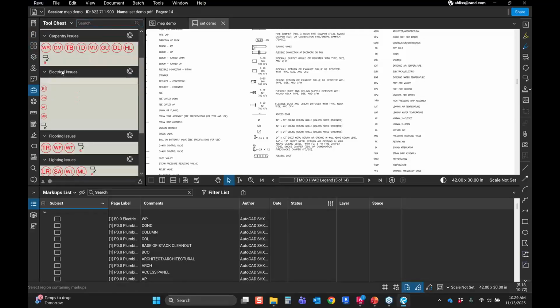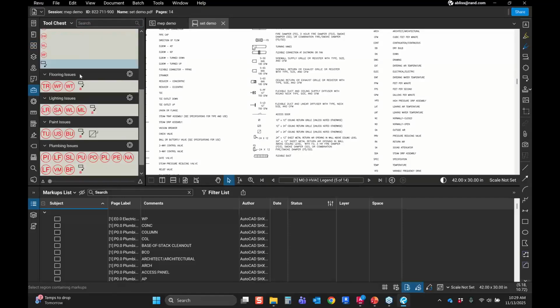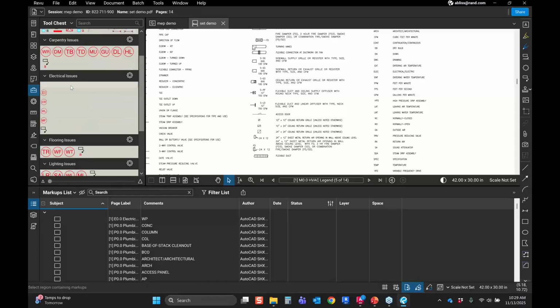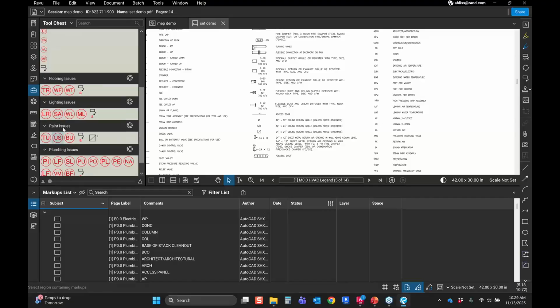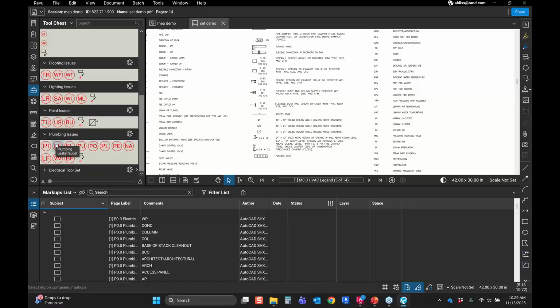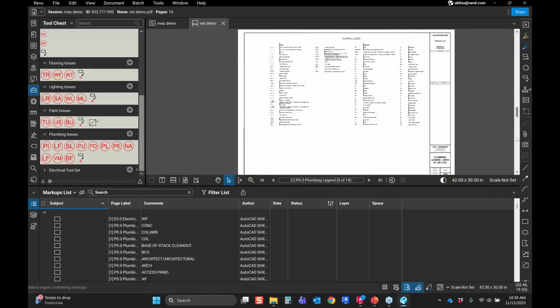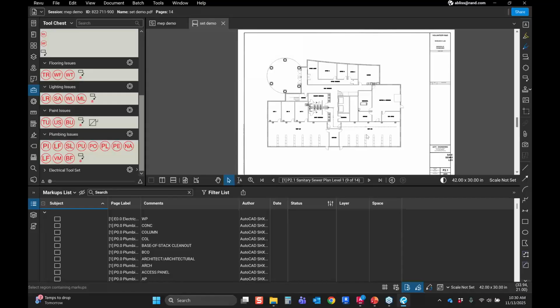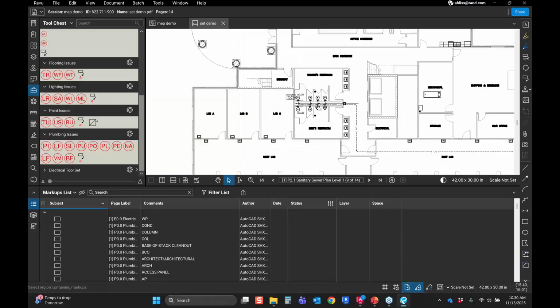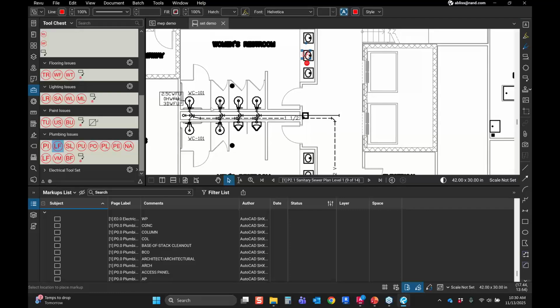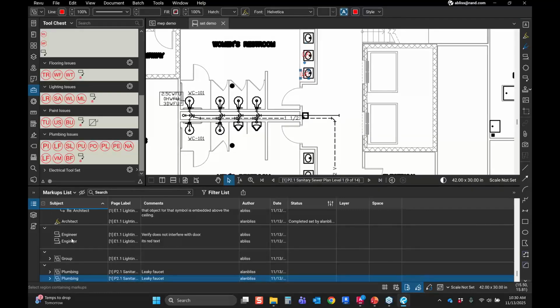Okay, so here's the field issues profile. On that one I've got a lot of little punch keys ready to go. Here's some electrical, some construction paint ones, plumbing. Let's look through. I think I have some plumbing sheets in here. HVAC. There's some plumbing, so we can go in here and say, okay, I'm in the field, got a leaky faucet. And just that quick, I can go through, and I know these punch list codes.